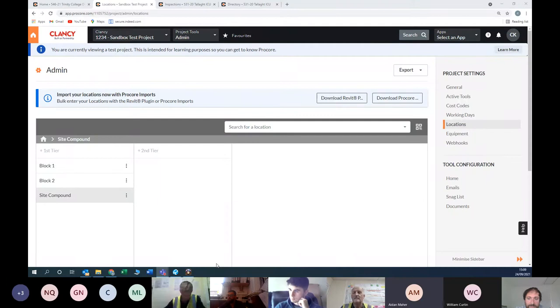I think, Brian, it's very good for checklists as well. If you're closing walls, you want to close walls and take photos of the walls, so that it brings you right to that location. It's also very good for installing the fire doors. You can have a tag on the back of every fire door, and the carpenter can take photos of every door before he puts on the architrave to show the fire mastic around it, and you have your evidence. Correct. They can be very useful if you use them for those.